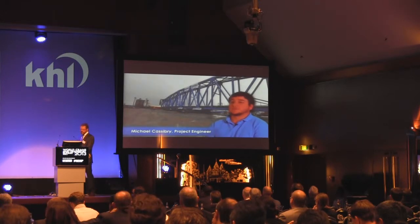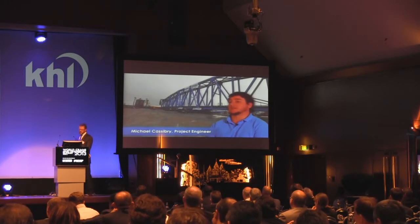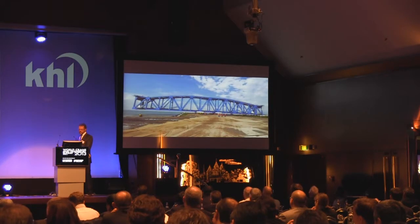We decided to make the road with plastic mats. We surveyed the yard, taking measurements, and came up with a plan for the number of mats needed. We soon had mats rolling in by the truckload. We laid the mats out, built the road, and stayed on schedule.